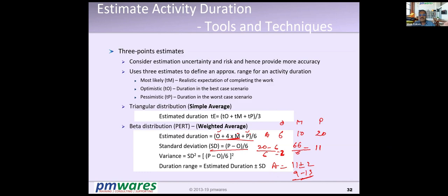We do this when we have risk in the project or more risk in the project, in many long-term projects which are expected to be marred with some uncertainties because of the outcome, because of the political scenario, because of many other things. This is called the 3-point estimate. We also have the simple average, that is this, but this is less used because P and O greatly influence the middle actually. So it may be skewed also sometimes.